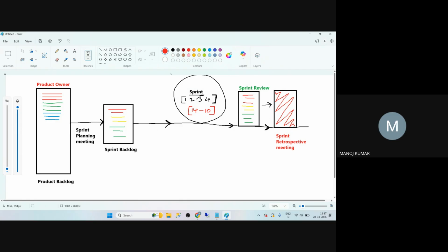Manoj, where can we write all these things? We are going to write all these things in the Jira board only. In the retrospective template, we are going to write. Now we got negative feedback. For future feedback, we should not get that. For that reason, what are the inputs we need to improve? We are going to give them in those retrospective meetings, and we are going to monitor all. We are going to take that as feedback. And for the future sprints, as a Scrum Master, I should not let that happen.